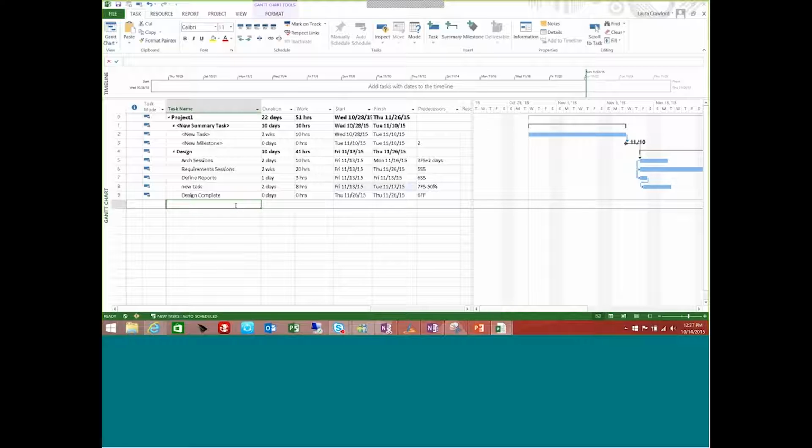All right, okay, so the next step in our scheduling for success, we've gone ahead, we've defined our project, gave it a start date, a calendar, the task mode, and the task type. Then we went ahead and we started typing tasks into our project plan. We gave it a duration and a work estimate. From there, we set some dependencies to start creating our actual project schedule here without typing in start and finish dates. I was saying don't type in a start and a finish date because what will happen is you would actually set what's called a constraint in a project plan.